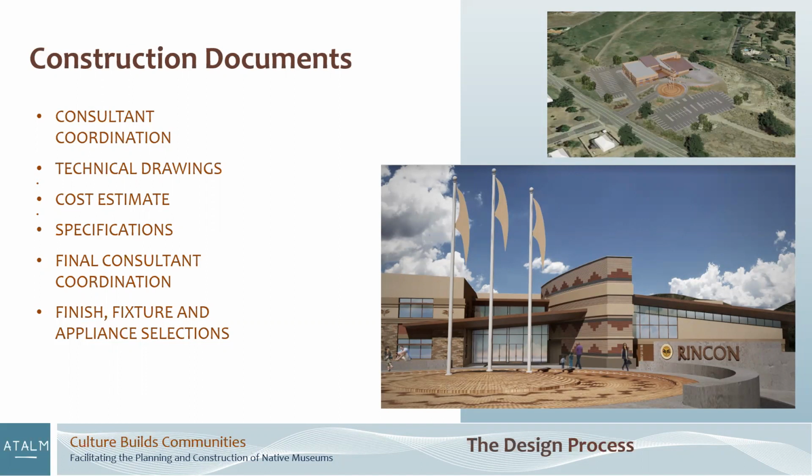When we talk about integration of a construction manager, owner's representative, we had on this particular project an owner's representative for the tribe from concept all the way through the build out and the turnover. So I think the sooner the better, because they can actually help translate the issues, they can keep the project on schedule, and they speak on behalf of the community and the leaders of the community.